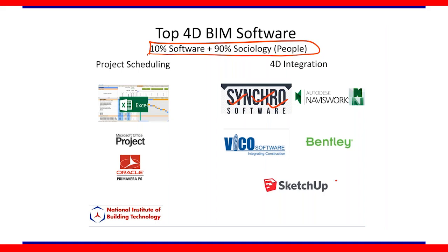Now, with visualization, SketchUp is becoming very common these days, right? What people do is, they're not necessarily getting a detailed schedule, but let's say they're trying to bid on a project. They'll get into SketchUp, build a quick block model, don't get into details, make a quick schedule, and connect it with the SketchUp model. In a matter of a few days, you have a fantastic model of how you want to build a building. It's very big picture, not detailed, not supposed to get into the manufacturing level or the detail level that 4D is really intended for. But this is very high-level pre-construction analysis that you could do using SketchUp. So that's why I kept it very low.